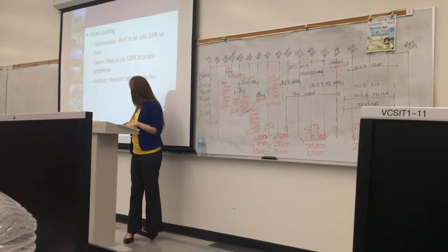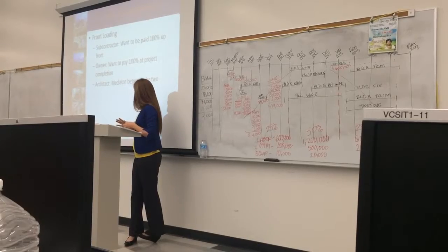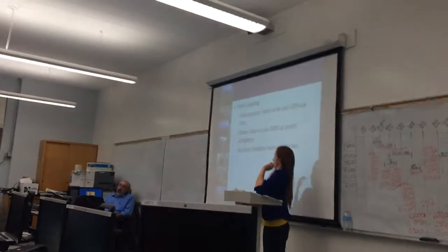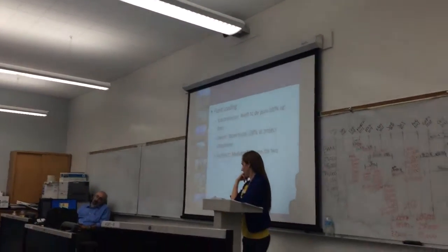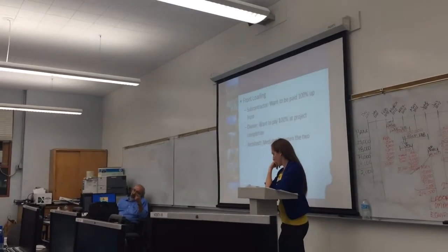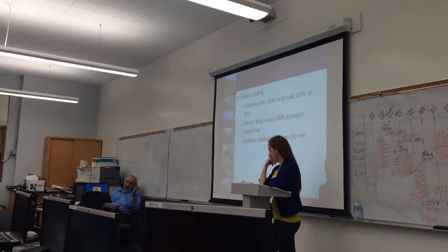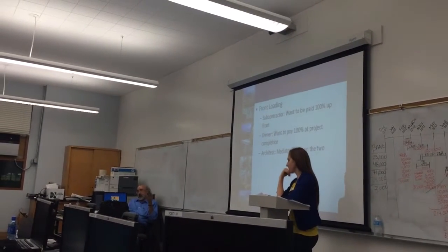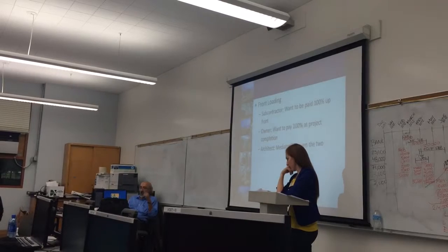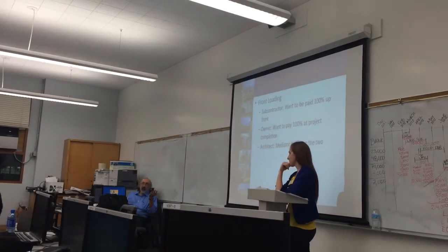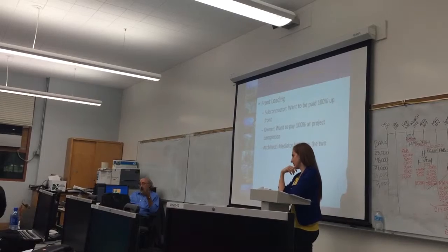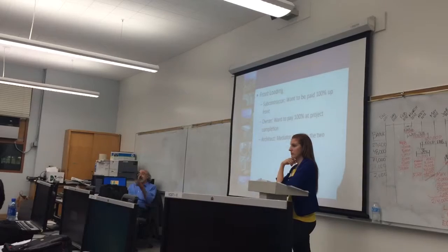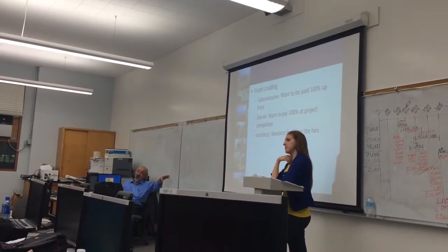There's also one other item on the change orders. Some projects, or a lot of them, when you issue a change order, they allow for larger overhead and profit to offset that loss that's going to happen on the loan. For example, your overhead and profit on a general contract was 7%. On a lot of change orders, they allow you to go up to 10% or 11% for your overhead and profit. So that money offsets that loss.